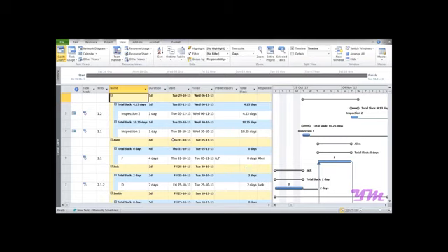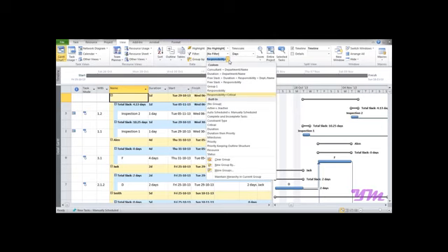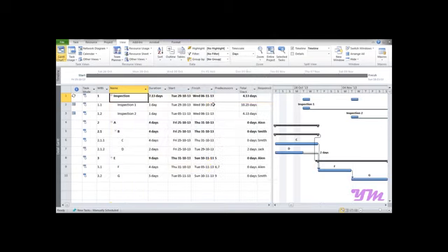So you can see over here the activities are grouped based on responsibility. Suppose if you look, there is an Alan over here, and under that we have all the activities listed under Alan which has a 0 slack over here. So this is how you can create, as you require, a multi-level group by function. Now in order to remove this group by feature, you need to click over here and just click no group, so that you will by default get back the starting screen. So this is all about the group by function.